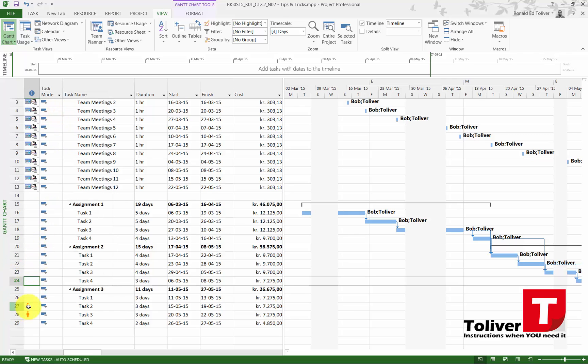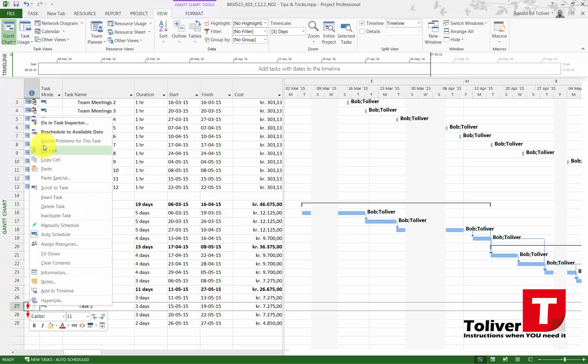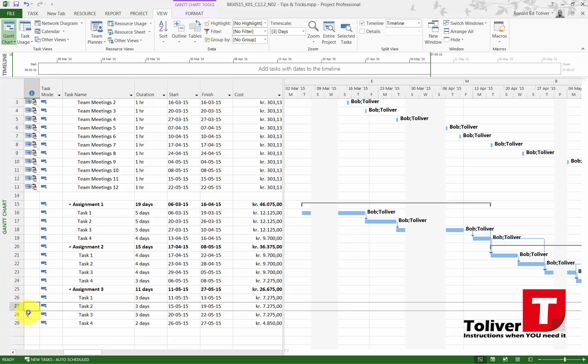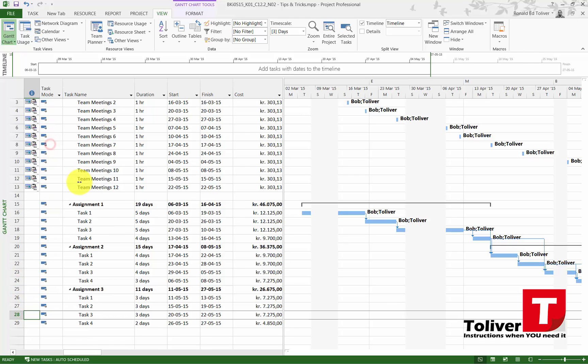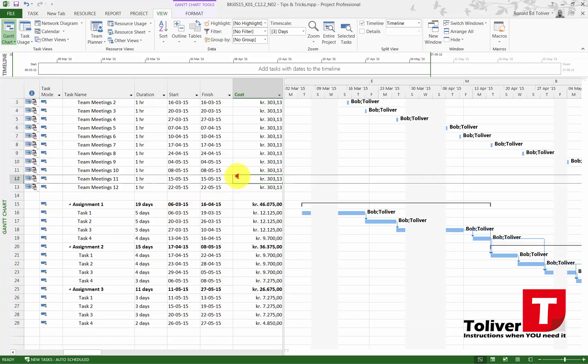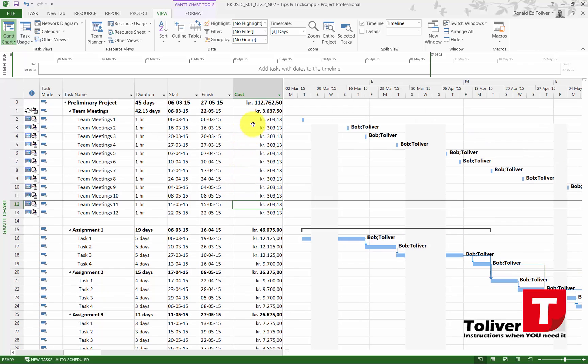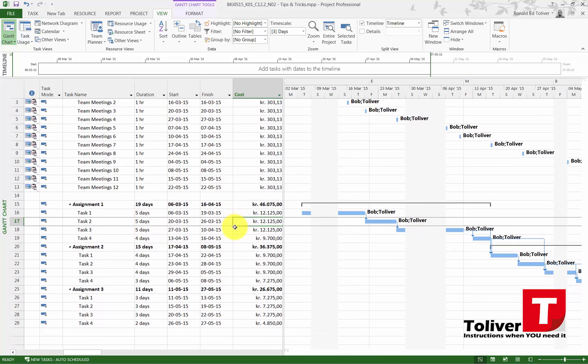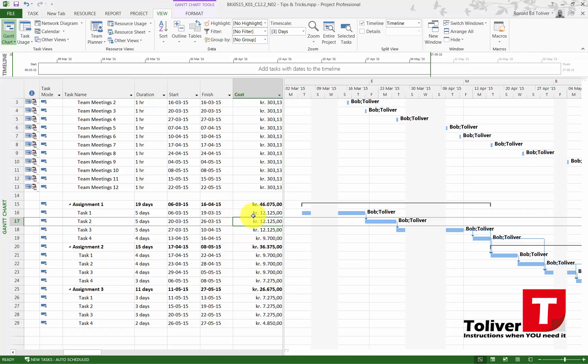The problem is I am still too expensive. If I look at my overall price I'm too expensive. I should only cost 90,750. So again, what I could do is ask, is it really necessary to have everybody working on the task at the same time?